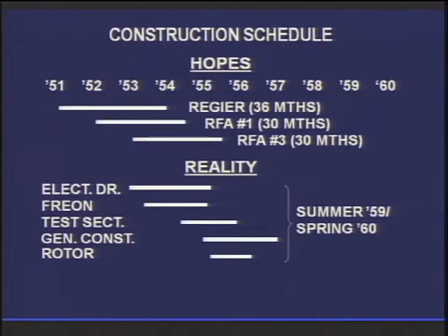So they go through two or three iterations, and finally they zero in that, hey, it looks like we can get this job done by the summer of 1959. That's a long time, right? This idea was sold in the summer of 1951. We're talking about the job being done eight years later. And McGill's talking about three years before it's going to be obsolete.